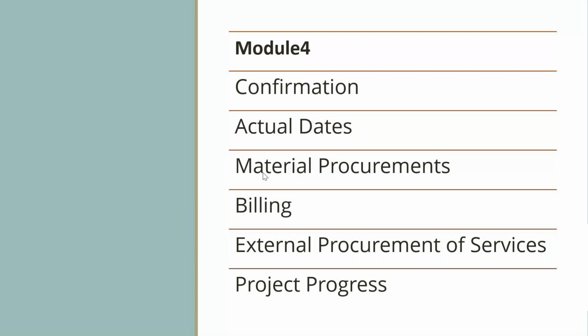You understand? So what is a project stock? Project stock is a specific stock only for that project, so that we can maintain it in project systems. That's the unique part of it, a very good functionality. These are parts of material procurement. When we do goods receipt and then invoicing, they will create actual cost in the project. So all these are tracked.